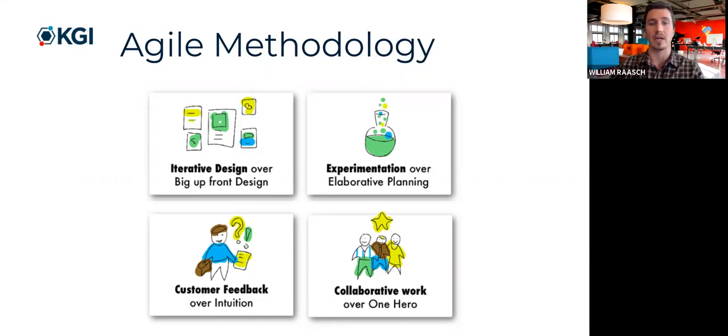And then that's one iteration. And then why don't we make the patient's evaluation of their symptoms better? And then that's another iteration. So rather than doing, hey, let's make everything better, roll it out as a 2.0 product, you're doing these steps one by one, seeing how the customer reacts, and then adjusting your path after that.